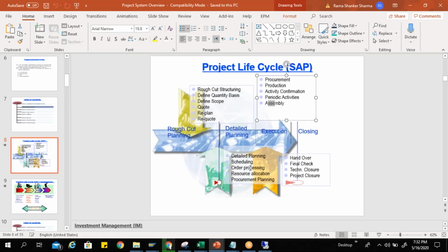It happens sometimes with liabilities, let's say if you are going for defect liabilities. For example, if I'm doing this same road project and I have one clause in my contract that for 3 years I have to provide all the maintenance for my road, I can say I have delivered everything, right? But still I can keep my project open because I need to consider the additional cost which is coming into my project. So whatever cost is coming in later stage, I can keep it in a separate WBS element parallelly. But as a system, I'll say this project is technically closed. That's it.